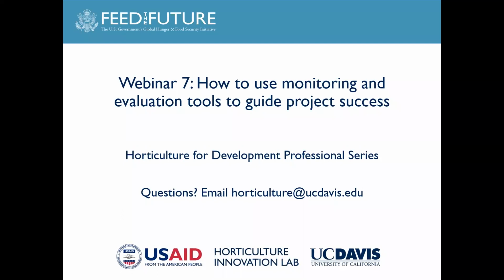Okay, well, I will say target setting, and I've talked a little bit, you guys can probably tell I'm a big advocate for practicing what you preach, right? So starting off from the proposal stage, oftentimes we are asked to set targets, and for the sanity of your implementation team, if you were to win this project, it's really to spend time talking to technical experts on the ground, talking to folks that have implemented similar or even the previous program to do target setting in a very intentional way.